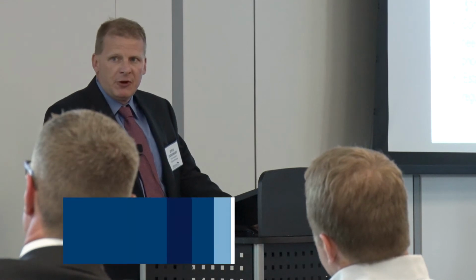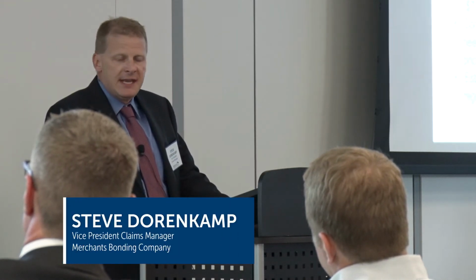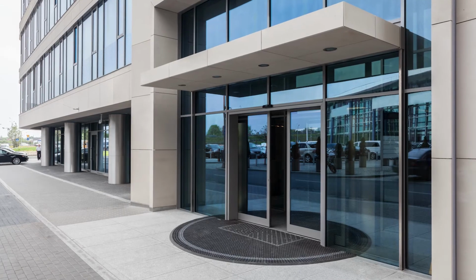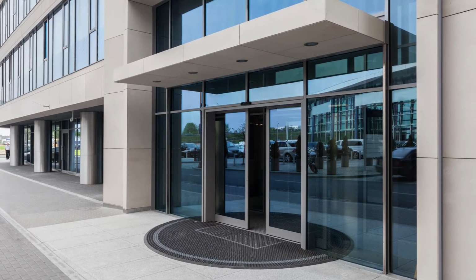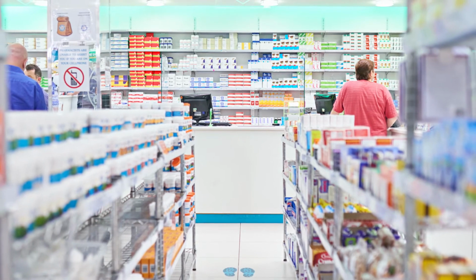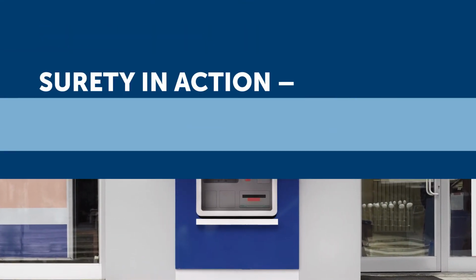Without the surety's involvement, the number of days delayed would have been that much higher, and the damages suffered by the private joint venture and their lending institution would have been very extreme. Overall, Merchants spent $800,000 in expenses to complete a $4 million project. The project was completed and avoided abandonment, delays and damages were minimized, and no encumbering liens and litigation were presented.